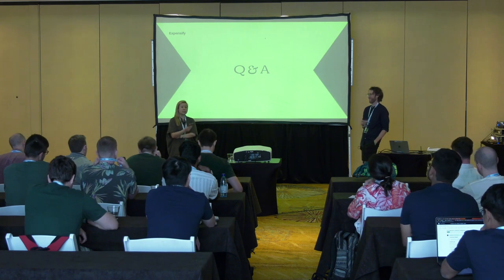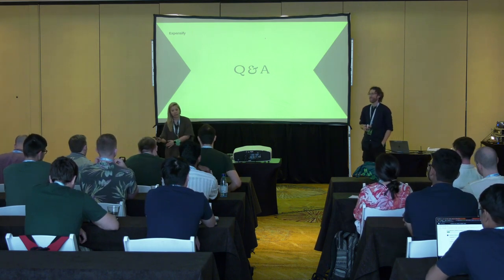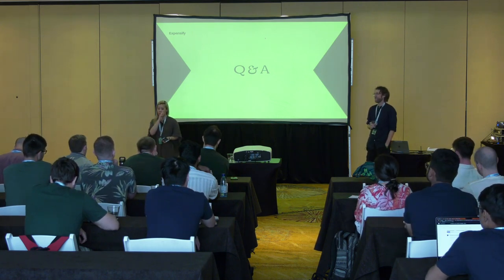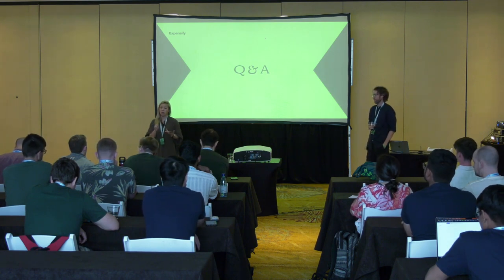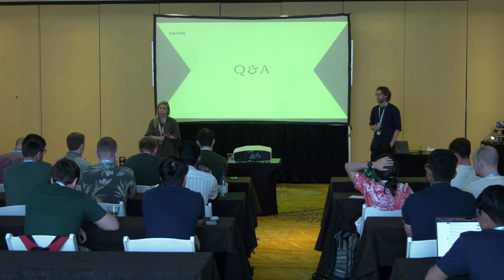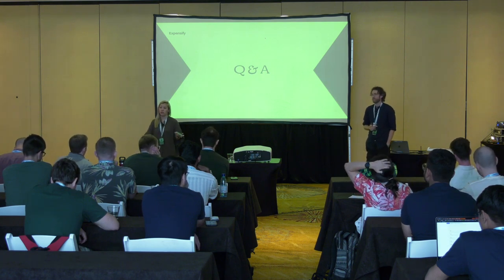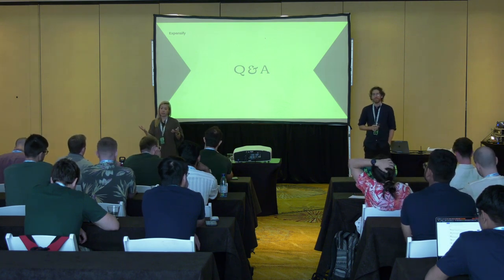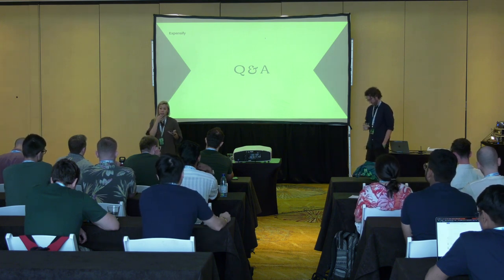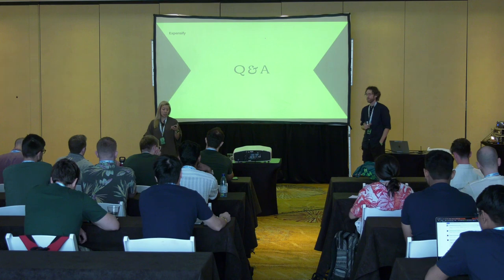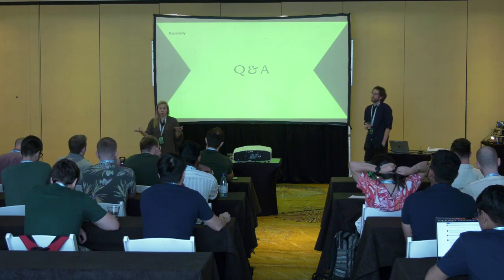Well, I was going to say, at the very end of the doc, there is a project wrap-up summary. And what we do is we talk about what went well, what could have gone better, what were the conclusions, and what would you have changed moving forward. That's part of the process for us in terms of figuring all that stuff out. Sometimes that does come out right after, but that's one tool that we use.